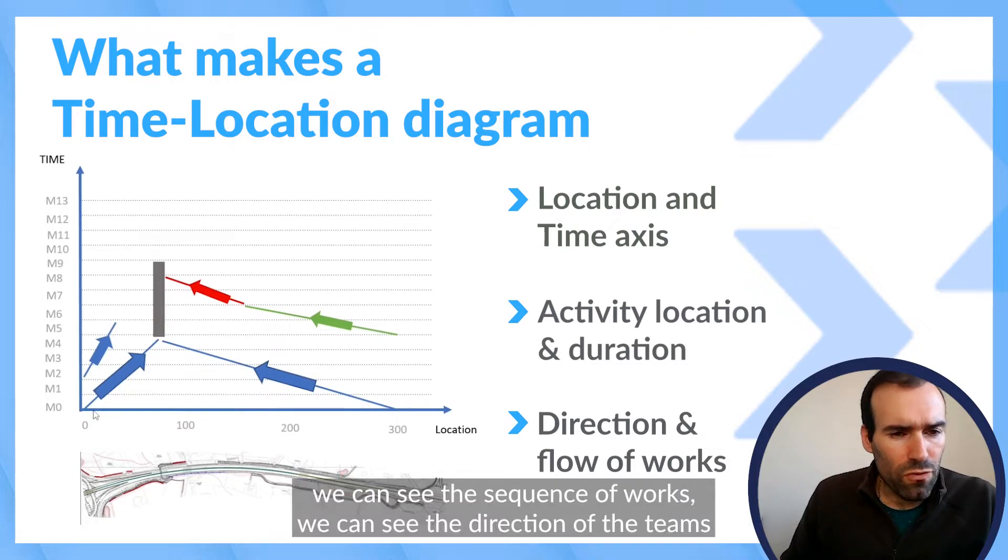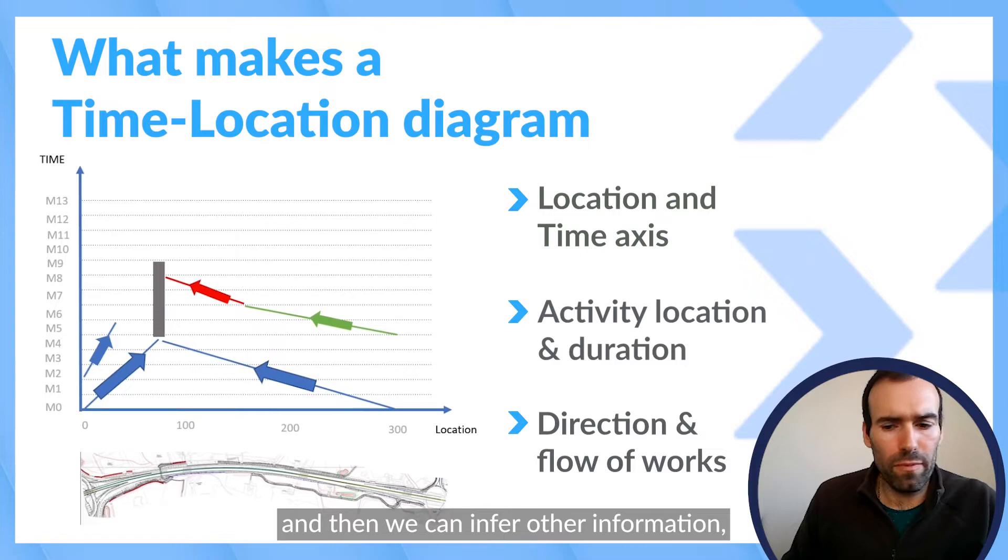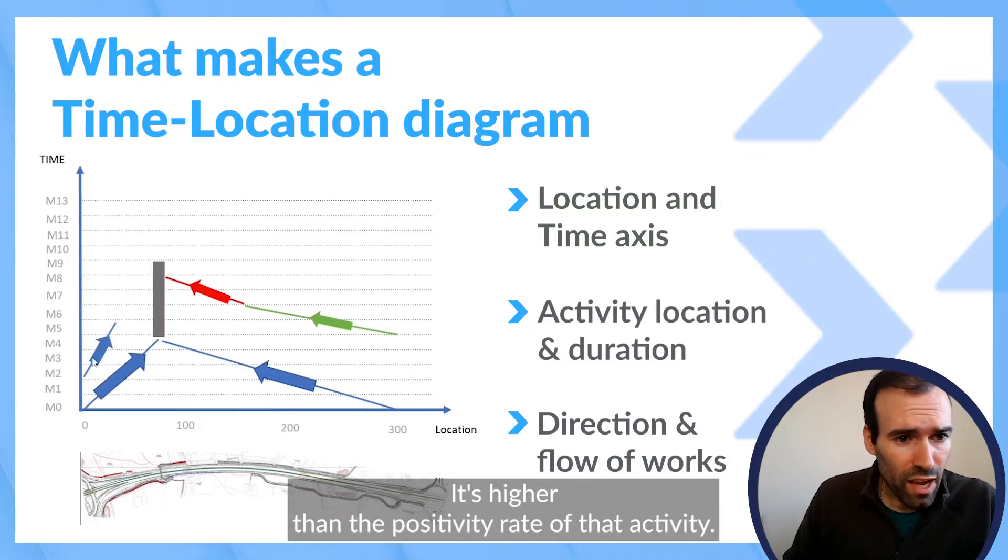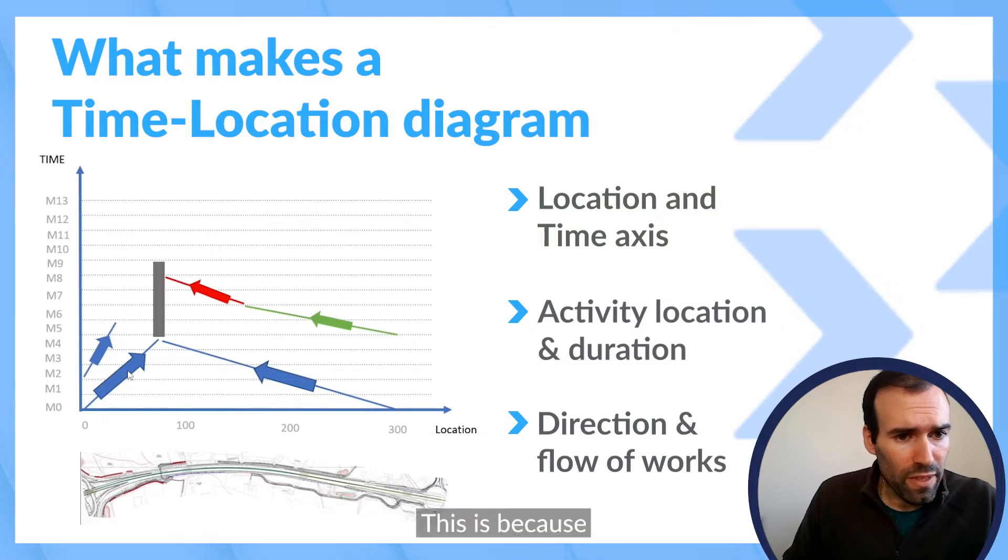We can see the sequence of works, we can see the direction of the teams, and we can infer other information like the productivity rate of this activity is higher than the productivity rate of that activity. This is because